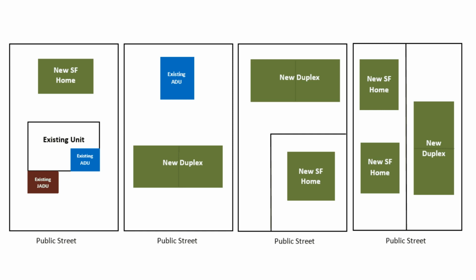Step 2. Submit a complete Senate Bill 9 application packet. If you determine your project is eligible, you may apply for the Senate Bill 9 2-unit development and/or the urban lot split using the Universal Planning application. In addition, the following forms are also required for a complete application: Owner Occupancy Affidavit, Prior Tenancies Affidavit, Draft Deed Restriction for 2-unit development, Draft Deed Restriction for urban lot split.